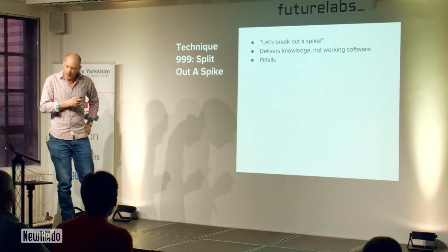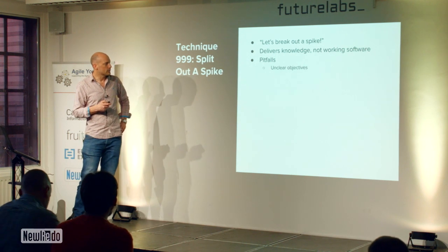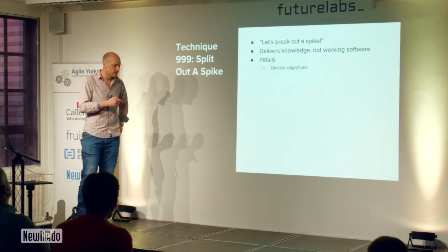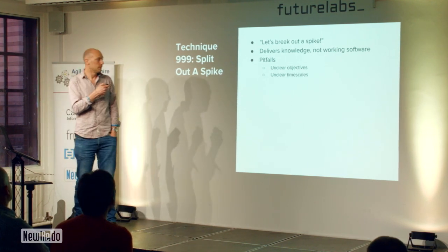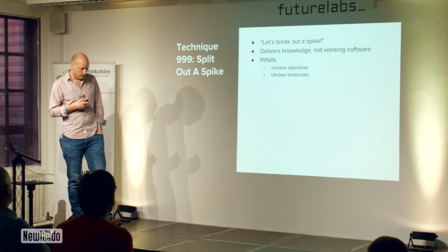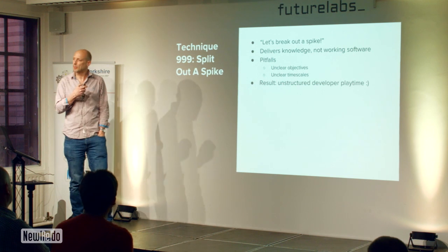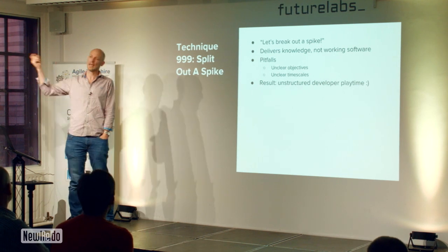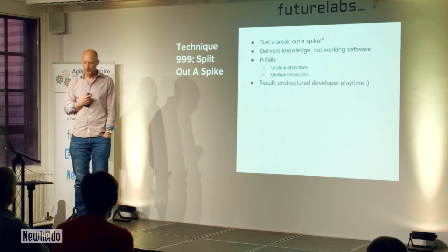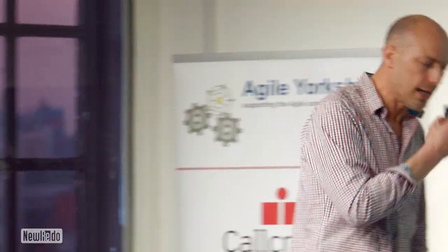Now, there are some pitfalls though. My experience with spikes is it is sometimes the case that we forget to define the objectives of the spike very clearly. And we also sometimes forget to time box the spike. So you then end up with unstructured developer playtime, I like to call this. It's like a developer saying, yeah, go and spend an unspecified amount of time on an unspecified thing. Have fun. And usually every day at the stand-up, they go, how's that spike going? Yeah, it's kind of getting there. It's almost done. It's 80% done. And it just goes on for days and sometimes weeks. I've had spikes that have just gone on for weeks. And then you get to the end of them and the thing that's being delivered isn't necessarily really what you're after anyway.